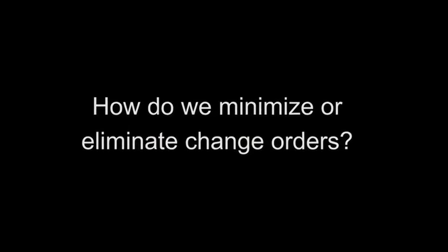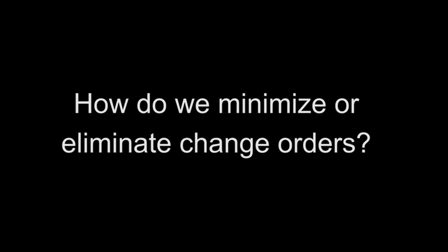Yeah, so the planning is just that. It's making sure that, number one, the funding is there with a healthy capital reserve plan in place. Getting out, doing an initial investigation, and identifying any potential issues that could come up. You really want to limit that before the project starts, because then you have to deal with what everyone fears the most, which is change orders. You want to eliminate that as much as possible.